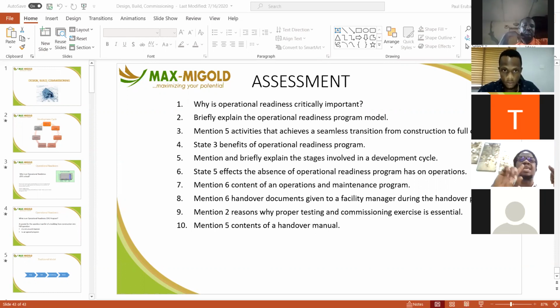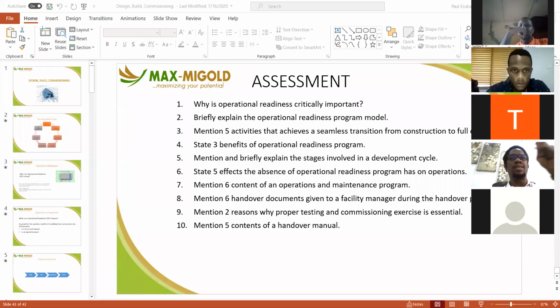You must attend every site meeting, for example. You must be part of the snag listing. You must be part of all inspections, all testing, all commissioning. You must be part of all of them. And every change from the intention of the original design in the construction must have your own sign off as part of the change control, management of change, MOC process on that project. If you can work your way into that level, you will avoid being in the situation you are in right now. But where you are right now, you really can't abdicate anymore.